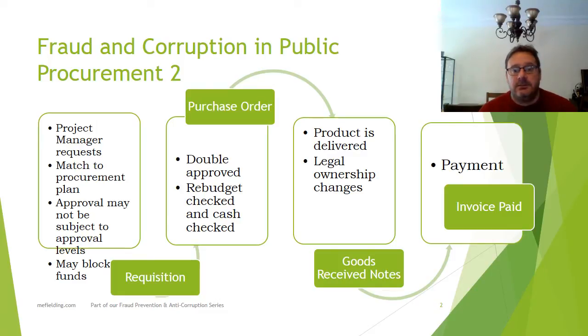At that stage, you would always get it approved. Now, normally the approver will be someone who works alongside him, and that approver will want to see that it's in the procurement plan. So therefore, in the plan somewhere, we buy a computer, we buy a phone, we buy a camera, whatever actually is needed. Well, there is some ubiquitous code that relates to purchase of sundry electrical items. So we get this idea that it's approved.